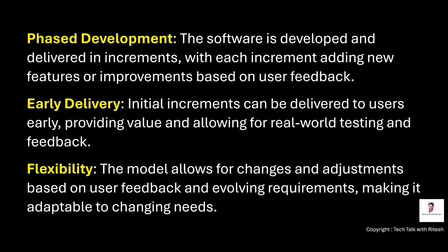To make a static website is easy to develop because all we are playing with is text, images, etc. Now since we are delivering this static website in phase 1 as early as possible, we will make a good impression in front of the client and the customer, because it will add value to the client, and also in the next phase the client is going to receive the second, dynamic functionality.